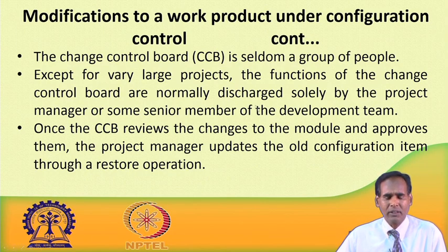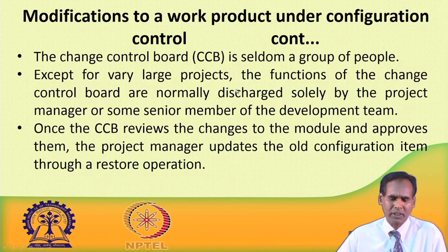So, now let us see who will be there in the CCB. Normally, the change control board is seldom a group of people. For a smaller project, the project manager himself takes the role of the CCB. Except for very large projects, the functions of the change control board are normally discharged by the project manager or by some senior member of the development team. So, once the CCB reviews the changes to the module and approves all these changes, then the project manager updates the old configuration item with the new one through a restore operation.